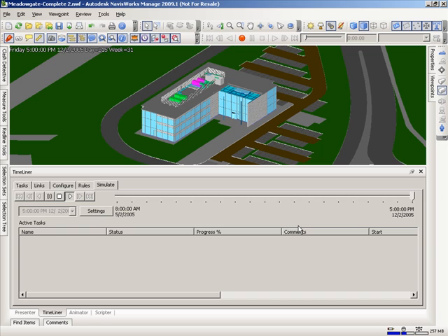One final tip is to understand that a lot of designers, when they create their models, are not going to account for temporary construction. Things like scaffolding, cranes, storage trailers, all of these will not be traditionally associated with the model. So by having a tool like Revit Architecture, construction professionals can literally model these temporary structures.